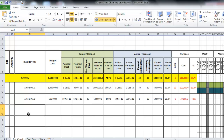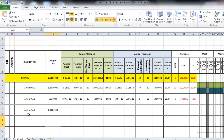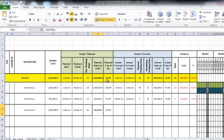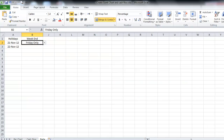Let's create one activity — activity number three. The budget cost is one million. The start date, let's say 1st November 2012, and the planned finish will be 25 December 2012. Automatically, the duration in working days will be calculated, the plan value will be calculated, and the plan percentage as of this data date will be calculated — based on your weekend and holiday settings.